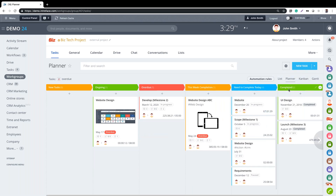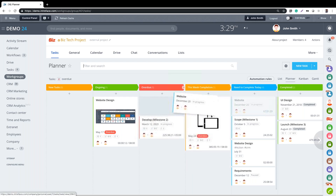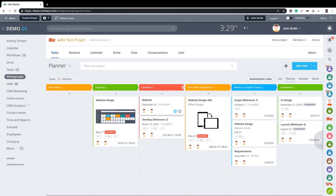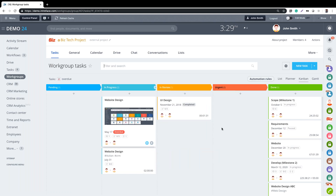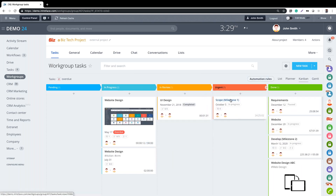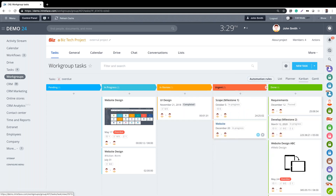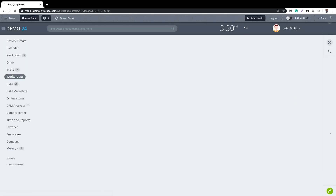We have a few different ways of viewing tasks within the project group. We're on the Planner at the moment - this is my own particular plan for delivering tasks. If I move a task across the columns, this will only be reflected in my own view. Looking at the Kanban, the stages are different, and if I move a task through a stage, this view will be reflected by all other members of the group.